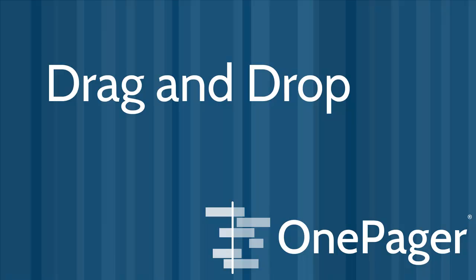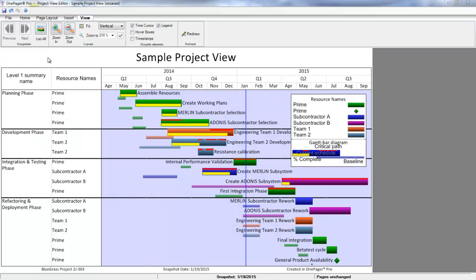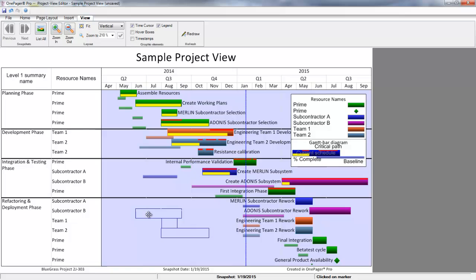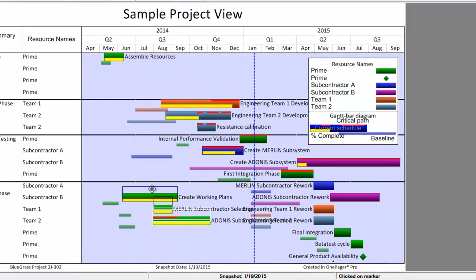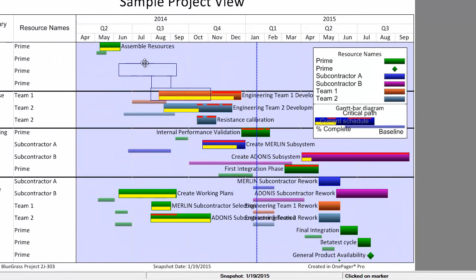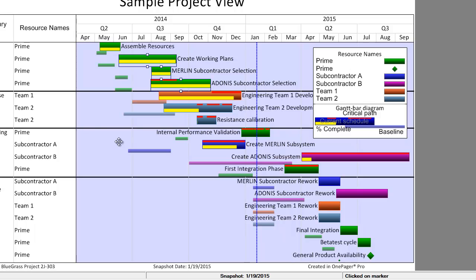Drag and Drop. Almost all of the visual elements in the chart can be dragged and dropped for the purposes of movement or resizing with a left-click and hold. There is one main exception to this, and that is while you can drag one or more shapes up and down in the view, you cannot move them left and right, and that is by design. If your dates are off, you have to go back to your source file, make changes, and then ask OnePager for a quick update. It's a simple process, and I'll cover that further in the demonstration.